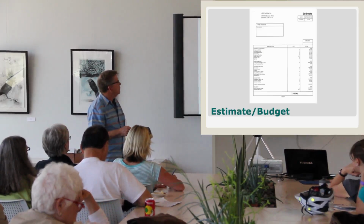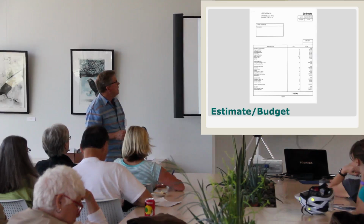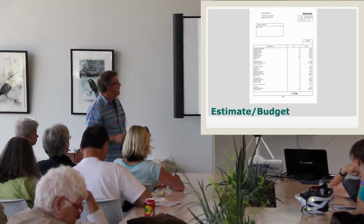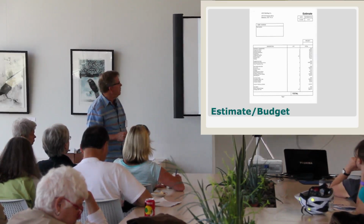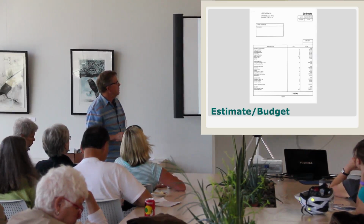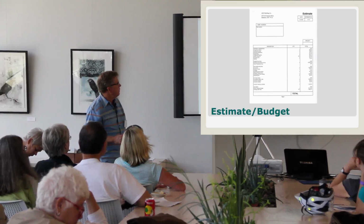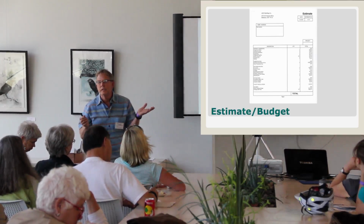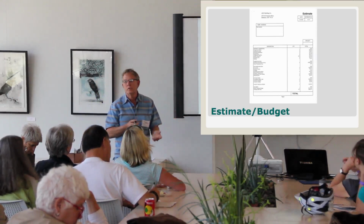Then, with some people, the most important part is what does it cost? I do a complete cost estimate, starting with design and drafting. I typically do all my own design work. I have a draftsman who works for me and produces the drawings. Through every line item, all the way up to cleaning the windows and ready to move into.